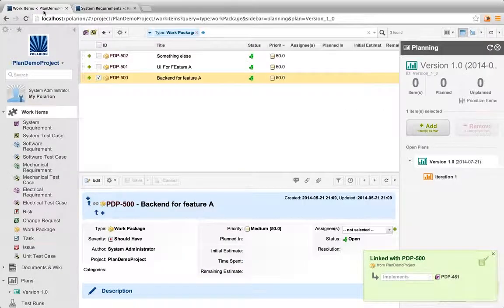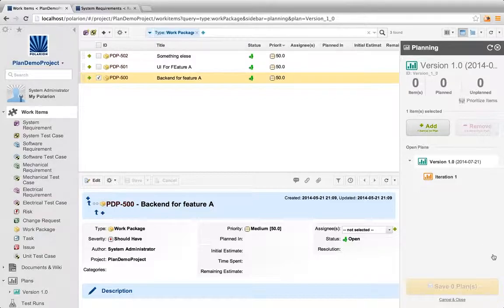So what I'm saying is that you have the stateless system or software requirements that provide the specification for developers, but the requirements are typically very overlapping and also very often too granular to be just planned for the release. It's much better to have a different kind of work item that describes the actual implementation flow, and we call it a work package.